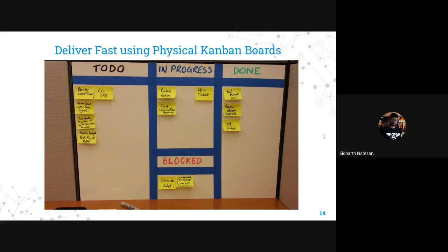In an active sprint we'll be having a list of items to do, a list of items in progress, and a list of items in done. Every morning we will refine this board. We'll plan on the daily stand-up call which task can be taken today, and then we will start it in progress. If there is a task in progress, we ask whether it is done. If it is done, then we move it to the done status.